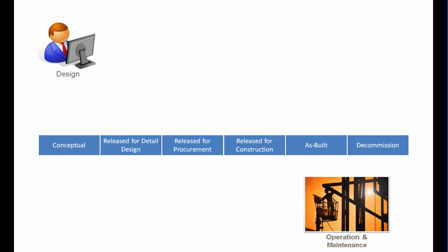So what we're doing proactively right now is engaging our system owners at our facilities to help us, or for us to help them and for them to help us, manage the functional tag and the creation of that accounting hierarchy much earlier in the process, so that these assets in these hierarchy locations can be quote-unquote handed over much earlier in the project execution process, so that it isn't an overwhelming task by the time it gets to the facility as an as-built or post-commissioning. And again, this is something we are proactively doing.